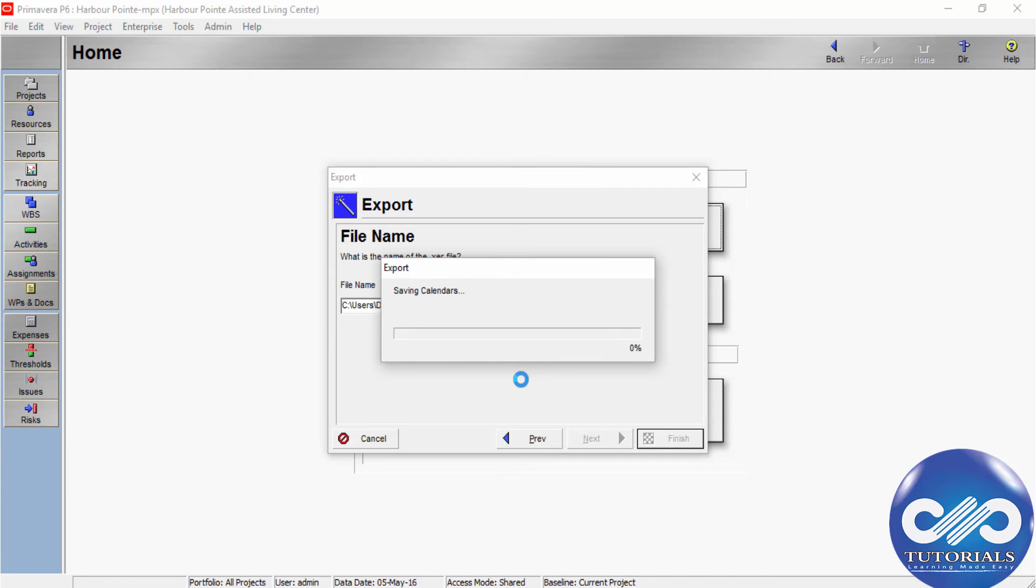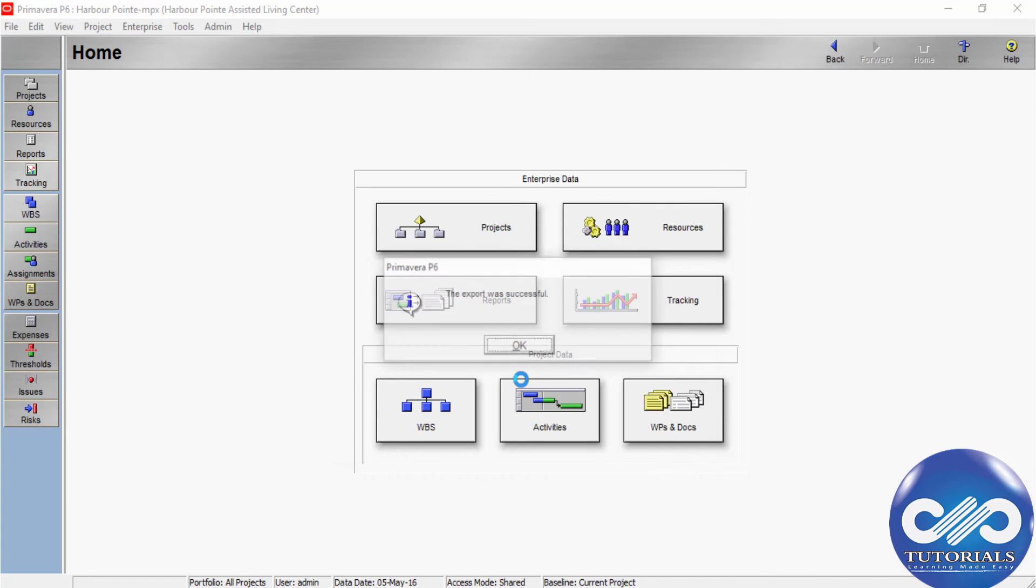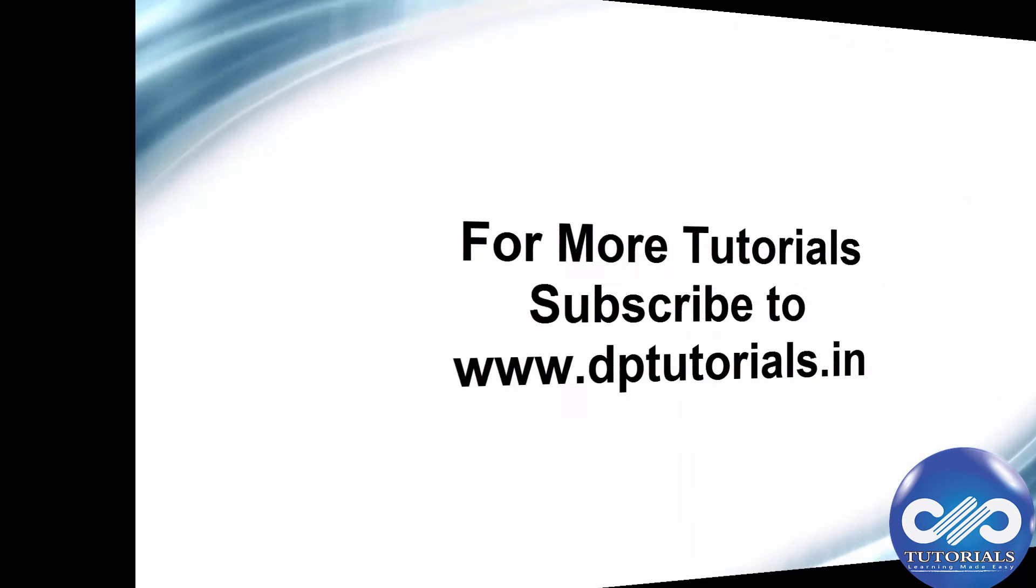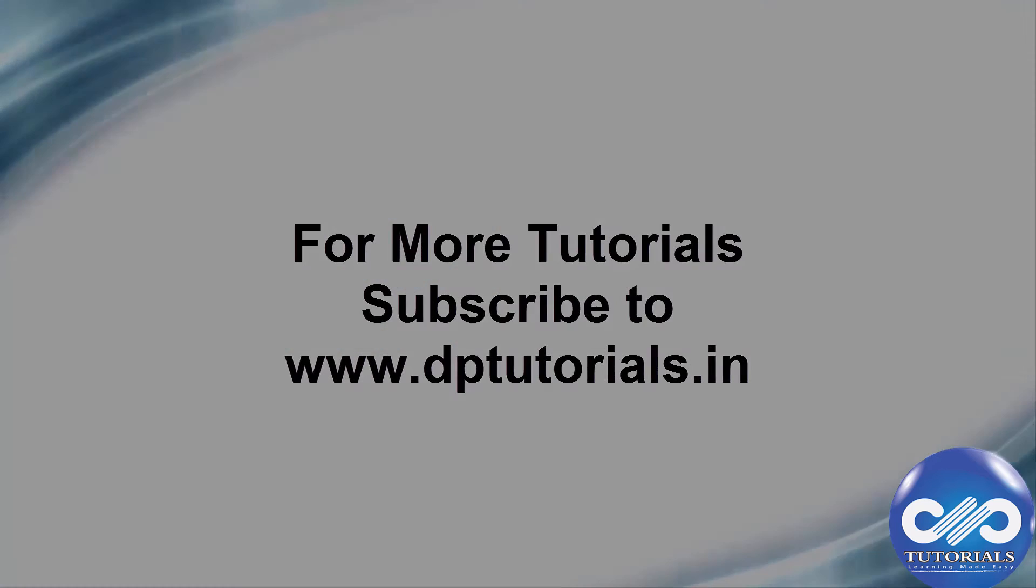This is how we export contractor project files and resource files. Once you get the updated schedule from the contractor, you can import these XDR formats to the P6 Primavera module, and thereby you have the updated schedule. This is how we transfer data from Primavera Contract users. I hope you understood this video tutorial. Please subscribe for more upcoming videos. Thank you.